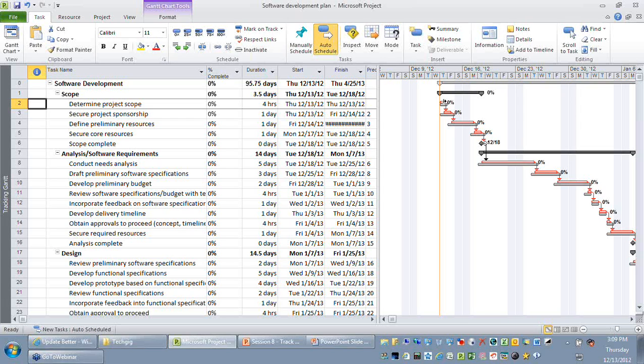The second column is, you can see this percentage complete column is an editable field. But the challenge we have with this percentage complete is, it does not consider your status date as a reference date. So if I say an activity is 50% complete, whether it happens before the status date or after the status date, the successor activities will not get rescheduled. So the first step is, I don't want you to use the percentage complete column as an input field, rather use it more as an output field in this case.